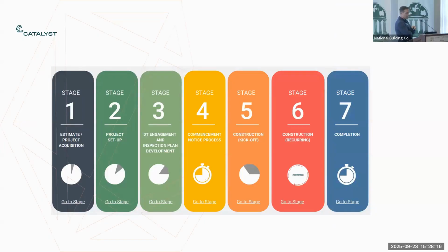As some of the speakers earlier have noted, there's a minimum standard for the drawing information that goes on to the BCMS. So when we request the drawings, the first thing we're doing is using that information to understand the building, to see how it's going to be broken down, what work packages are involved, who is responsible for designing what, and what specialists we have.